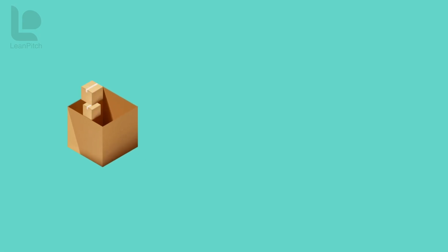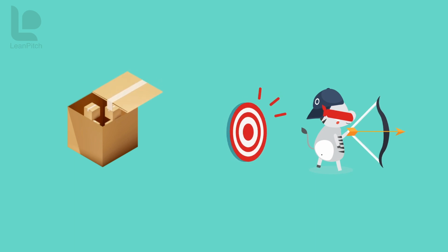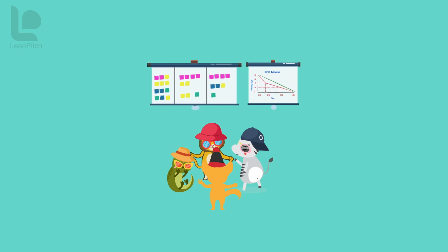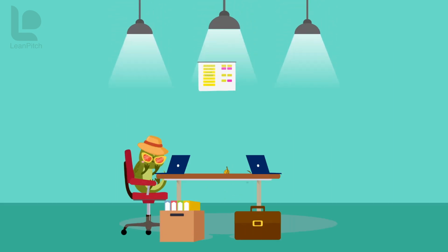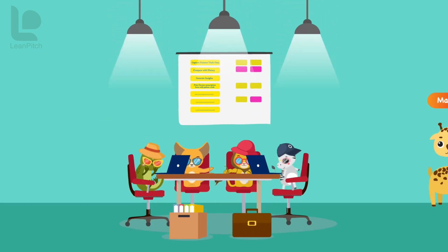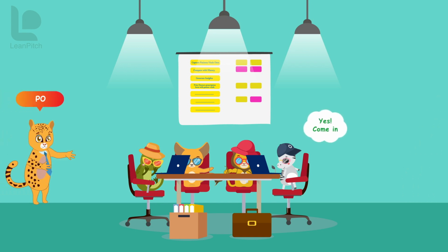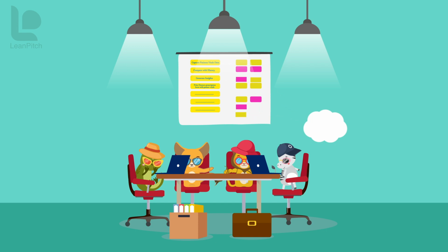While building complex products, it's easy for teams to lose focus. Hence, the Scrum framework suggests that teams inspect the progress towards the sprint goal and adapt their plan accordingly on a daily basis. This event is called a daily Scrum. It's meant for the development team. So, how they do it and who they involve is at their discretion. If you complete an item or more in a day, most probably you may not need the meeting, because as and when an item is done, it presents an opportunity for inspection and adaptation.